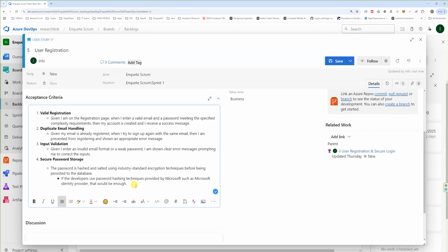Like I said, it's not enough that the analyst says it with his mouth. No, he has to put it in the document because this is the document you're going to always refer to. Because sometimes the analyst could say something or not say something, and he'll say, "Oh no, I told you to do this. I said it during the meeting, but you did not document it." Or he might even lie that he did not say it. So make sure if you have any interaction with the analyst or even with the product owner that affects a user story, it has to be documented. It has to be written down because that's what you will refer to, and it will prevent misunderstanding. Next question. Is there any question? So this is the refinement. This is how the refinement goes.